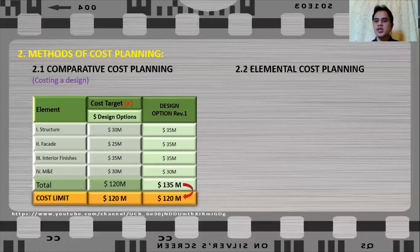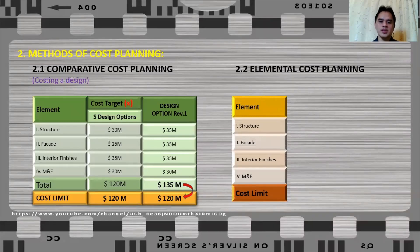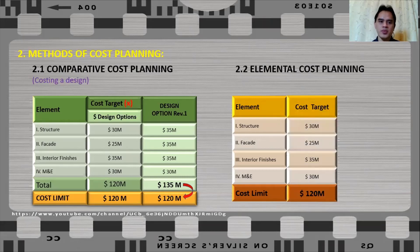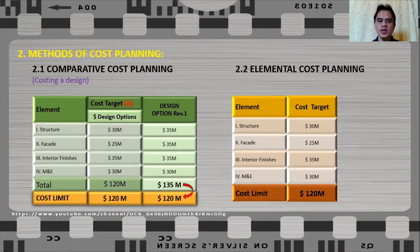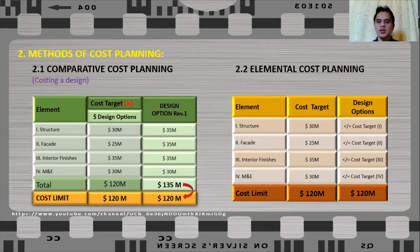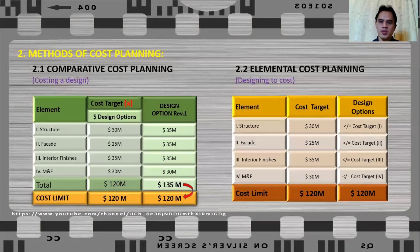Now for elemental cost planning, using the same elements — structure, facade, interior finishes, and mechanical and electrical — the cost targets are fixed: $30M for structure, $25M for facade, $35M for interior finishes, and $30M for mechanical and electrical, with a cost limit of $120M. For elemental cost planning, the designer is constrained by the cost target, so whatever design options are proposed, the cost must be less than or equal to the cost target. That is why it is called designing to cost — the designer must fit its design options to the agreed cost target.